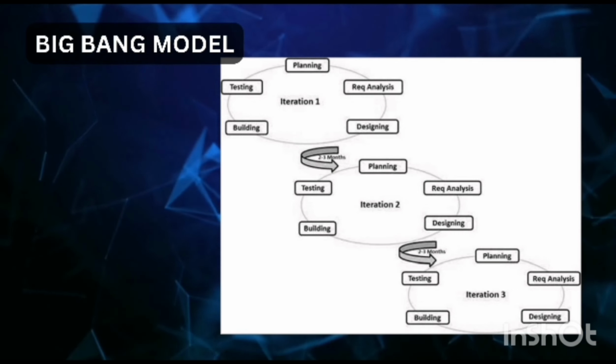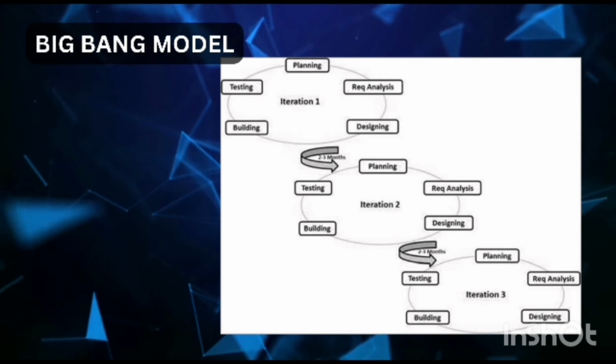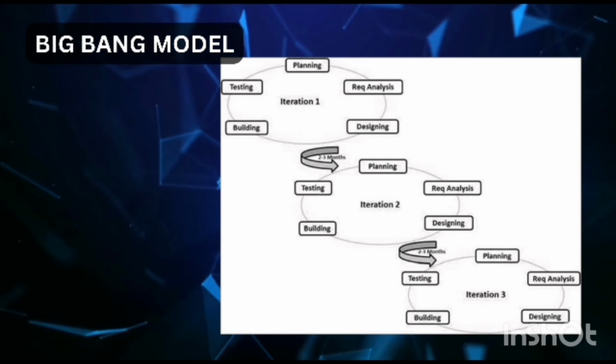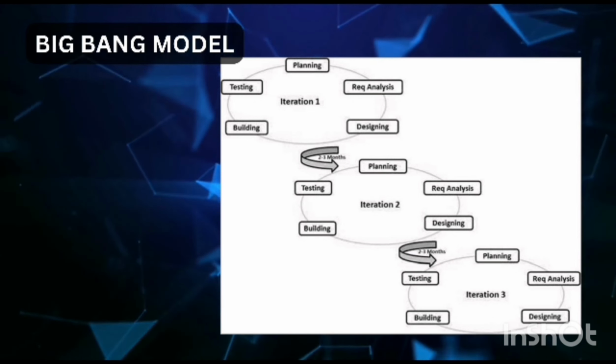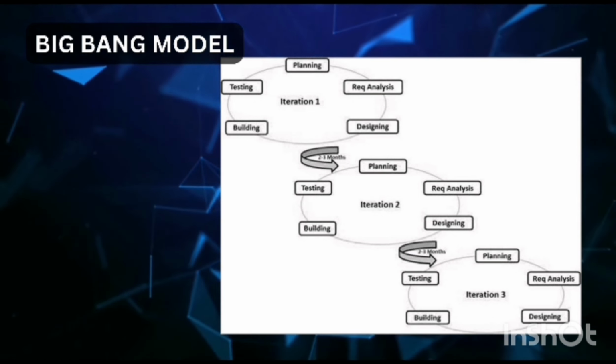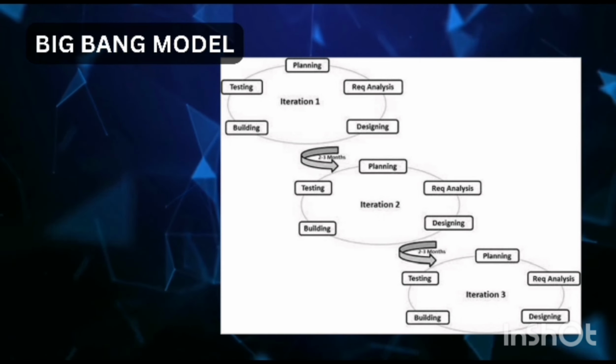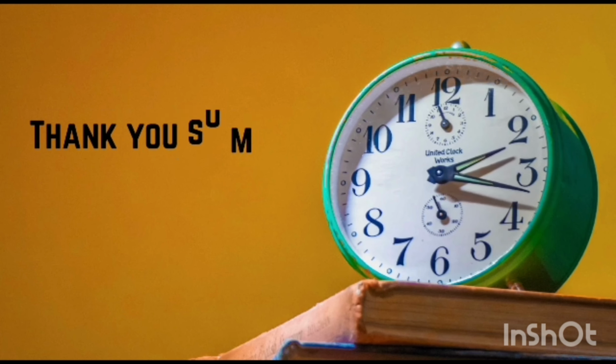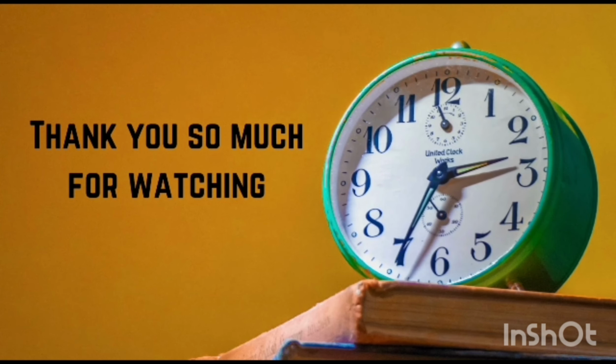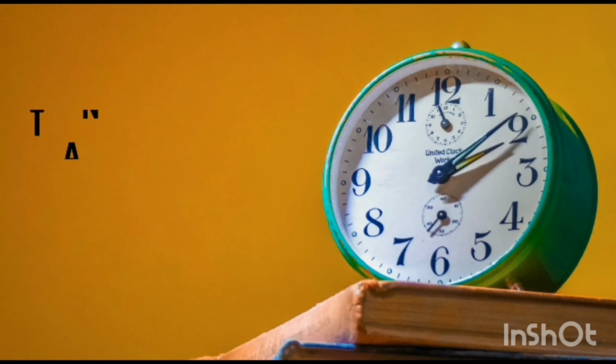The advantage of the Big Bang model is that it is very simple and requires very little or no planning. Easy to manage and no formal procedures are required. However, the Big Bang model is a very high risk model and changes in the requirements or misunderstood requirements may even lead to complete reversal or scrapping of the project. It is ideal for repetitive or small projects with minimum risk.